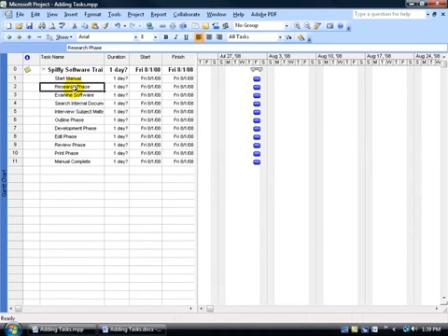Well, let's keep it simple and stay focused on our project summary task, because again, this is going to be a process and we'll cover how to define your summary task here, the phases that I've marked as summary task, in the outlining training video. But the point is clear that in order to complete our goal here, we have to complete everything below it. And you'll notice as far as the hierarchical structure goes, it indents it over just a bit. Duration is 1 day. That's a reflection, the project summary, of the duration of the entire project.